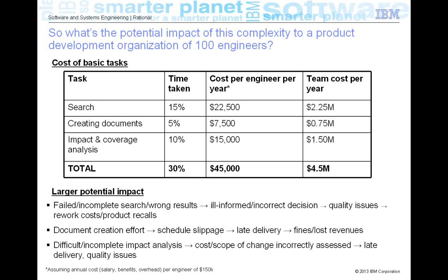and 5% of the time has a dollar number to it. The third and important aspect is about impact and coverage analysis. Impact and coverage analysis is like picking a focus point, say a particular artifact, and seeing all its relations to other artifacts in order to determine the impact of a change to that artifact, or to check that there are relationships to other artifacts to verify coverage.